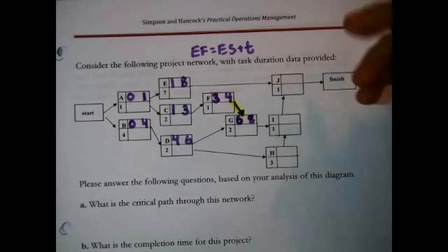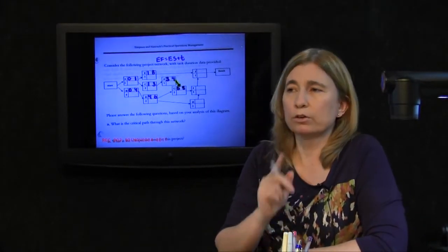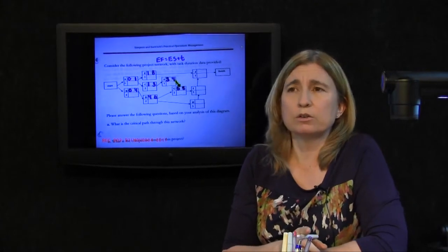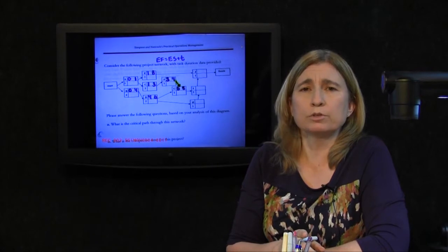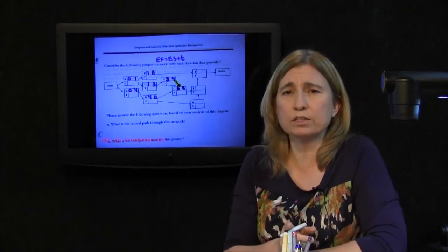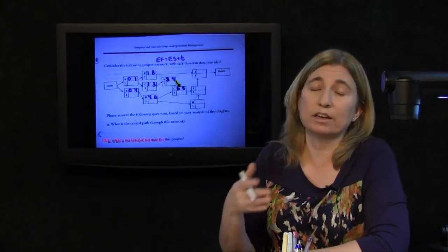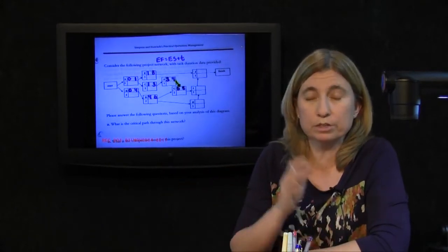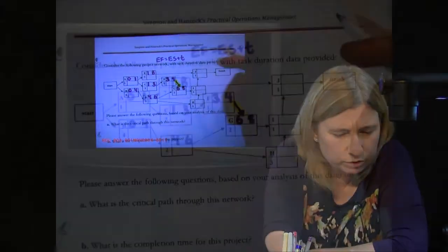Oh, and that is known as the early start time rule. The early start time of any activity is equal to the largest of the early finish times of all activities that precede it. This was just the first task we came across, the first activity that had more than one activity preceding it, so we had to check, pick the largest. All right, now we have to fill in the rest of these.